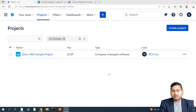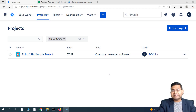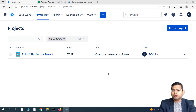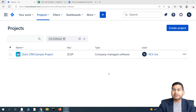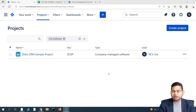The overall testing cycle is managed in different phases. So when there is an initial release of the software, there will be a test environment wherein system integration testing is performed. Then there will be another test environment or server wherein user acceptance testing will be performed. Then there will be another test environment which is very close to pre-production, where server specifications — like memory, RAM, processing capacity — are as close as the production server.